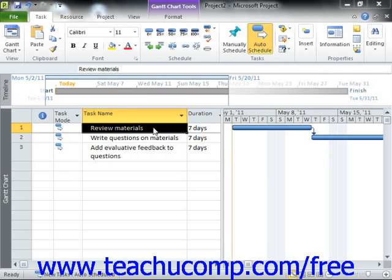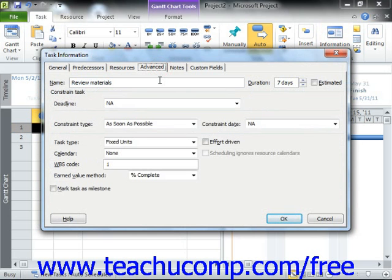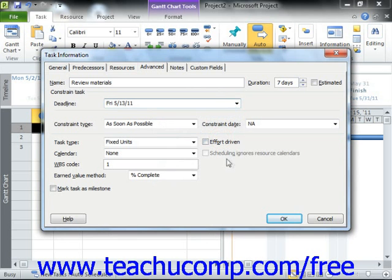To set a deadline date for a task, open the Task Information dialog box and then click the Advanced tab within the Task Information dialog box. You then select the desired deadline date from the deadline drop-down. Finally, click the OK button to set the deadline date for the task.